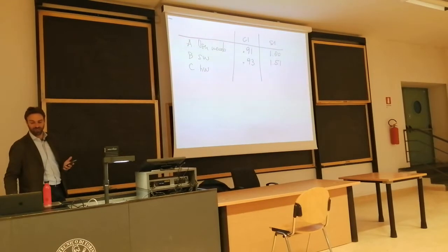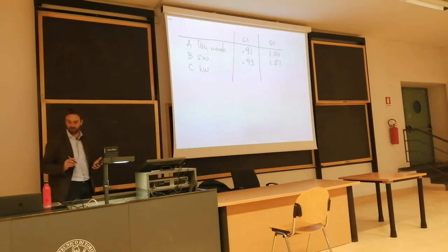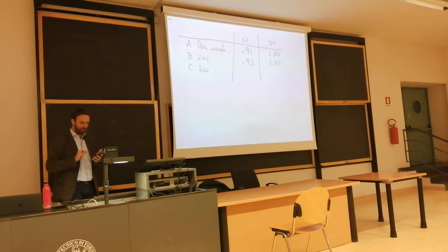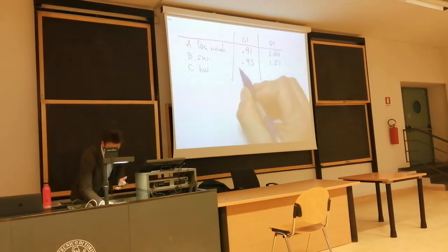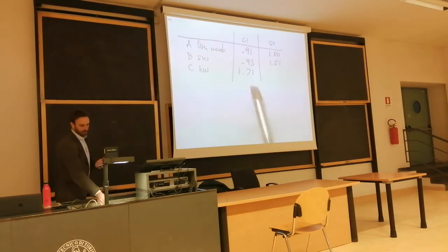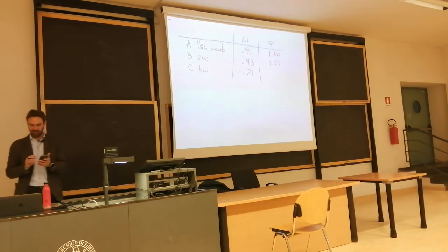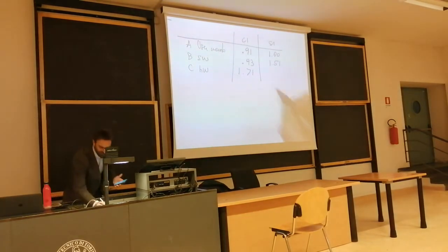We did an earned value of 120 versus 70 of the actual cost. So it's 120 over 70, which means that we are saving money, 1.71. We are making huge cost savings, but we're late, likely because we are doing 120 over 150. So we are just performing 0.8